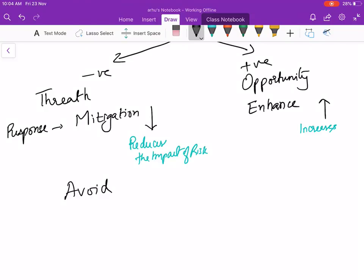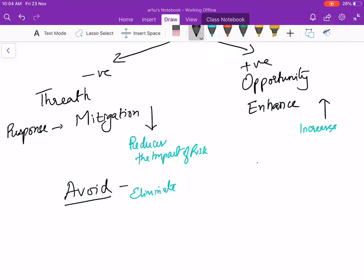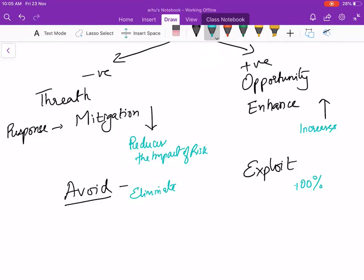In reality, avoiding means you are eliminating the risk. The corresponding positive response is exploit. In reality you will go and ensure 100% you get this opportunity. Like in one of the projects when I was working, we did a POC to show the client that we can do this new architecture using new software. We enhanced our probability of getting the project, and when the project was given to us we exploited that positive opportunity. Enhance was the POC, exploitation was the project being awarded.